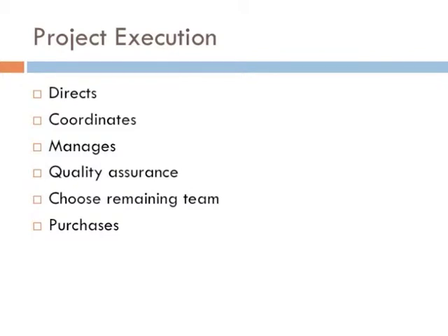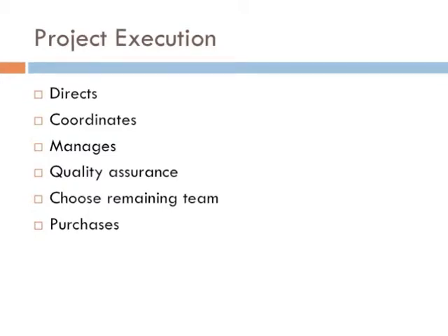Any purchases or subcontracting plans whose suppliers are not determined yet are finalized and contracts are negotiated. In a construction project, bid packages go out, for example, foundation, frame, roofing, etc. The plan for information collection and distribution is executed using clear and timely information in appropriate form, written or oral, formal or informal, using software or manual. Unexpected requests for information by stakeholders are responded to.